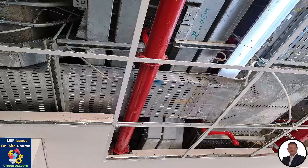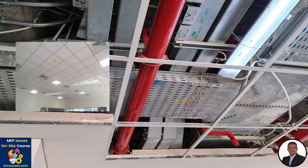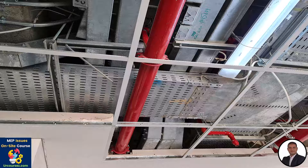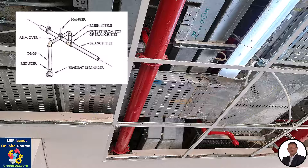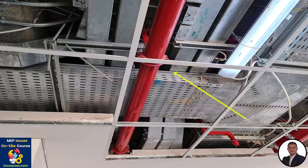As you can see in this photo, this is a false ceiling tile of 60 by 60 centimeters. We have many MEP services above the false ceiling and the space is very congested. We have a black steel firefighting pipe whose branch goes above the cable tray and trunk, which is wrong — we need to avoid any wet services above the electrical services. This is especially problematic here where we have a pipe fitting connecting the arm-over with the dropping pipe for the sprinkler.